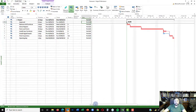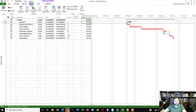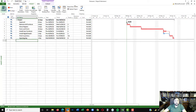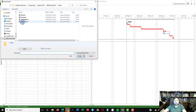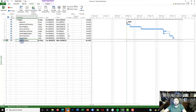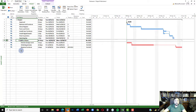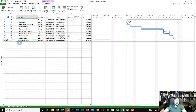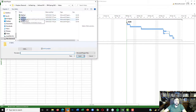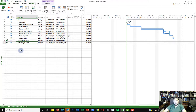Let's go back to our main project and see how we can embed these sub-projects. Go to the Project tab and click on Sub Projects, then select the furniture sub-project. It appears in bold, meaning it's a summary activity, and clicking the triangle expands to show the activities within that sub-project. Then go to Sub Projects again and insert the digital board sub-project. Both sub-projects are now in the master project but not yet linked to anything.